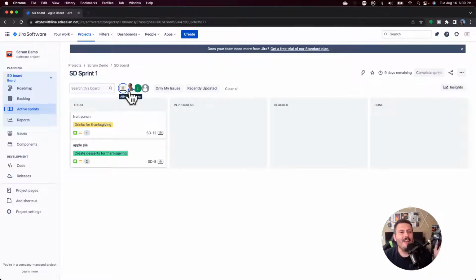So this is the little bubble I'm talking about, right? As soon as somebody is talking, you want to click on their bubble, and Jira will hide everything else and just show you that person's thing or their things, right? This is great because it allows you to very quickly, as each individual says what did I do yesterday, what am I doing today, what didn't go well, or what impediments I have, validate, oh okay, so they're working on this. Great, perfect. This is awesome. You're going to be able to do very, very quick sanity checks.